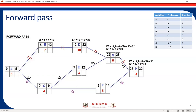As we have calculated the early finish up to node F, now we'll go to node G. Node G is dependent on two different activities: activity D and activity E. Early finish for D is 22, early finish for E is 12. We take the highest among these two, which is 22. So 22 will be the early start for activity G. Early finish equals 22 plus duration six, that is 28.